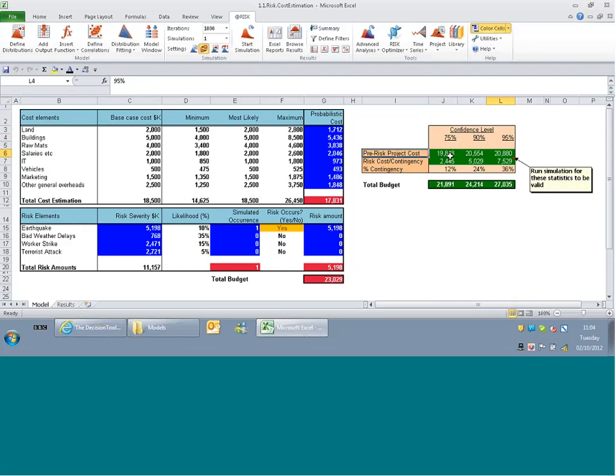And so I've split it down into two levels. This was the pre-risk project cost. So this was just this value here, and I'm using a function called RiskPercentile, which really just returns the percentile value into the spreadsheet from the simulation which I've run here for the project cost, the risk, and then here we have the total budget.